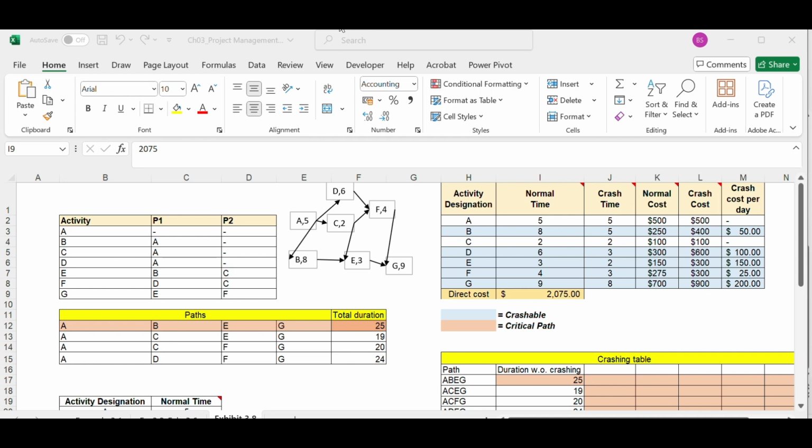But the availability challenge is a different scenario altogether. We have all the resources, but the resources are not available at the moment. It may occur due to unforeseen resource dependencies and result in a newer critical path. It can also happen due to resource limitations and bottlenecks. Having a realistic deadline and proper resource flexibility may reduce the availability challenge to an extent. Availability challenge arises from inefficient utilization of resources. This is a problem of technical and behavioral skills in resourcing. Both these challenges will have a cost impact. One remedy might be an outsourcing plan, but we cannot apply that in all scenarios.